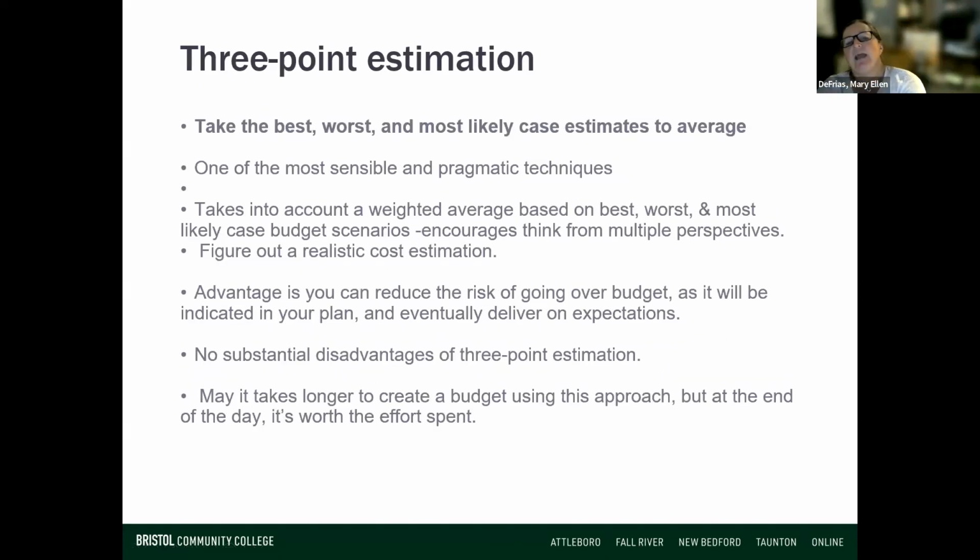All right, and then we have the best of all worlds, right? This is where you take your best case scenario, your worst case scenario, and your middle of the ground scenarios and estimate them to an average. Okay, this is a pretty pragmatic approach.